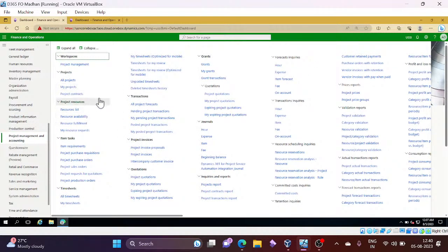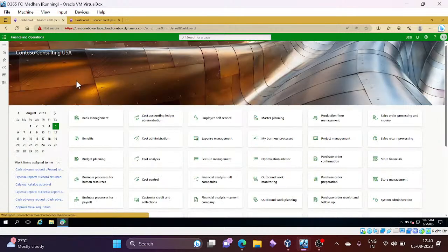So to do the adjustment for the transactions, go to periodic. There will be two ways. Go to a particular specific project, or we have periodic. There is adjust transactions. First we'll proceed with going to the project transactions. So how to go to all projects: select your project, and under the manage tab we have project posted transactions.